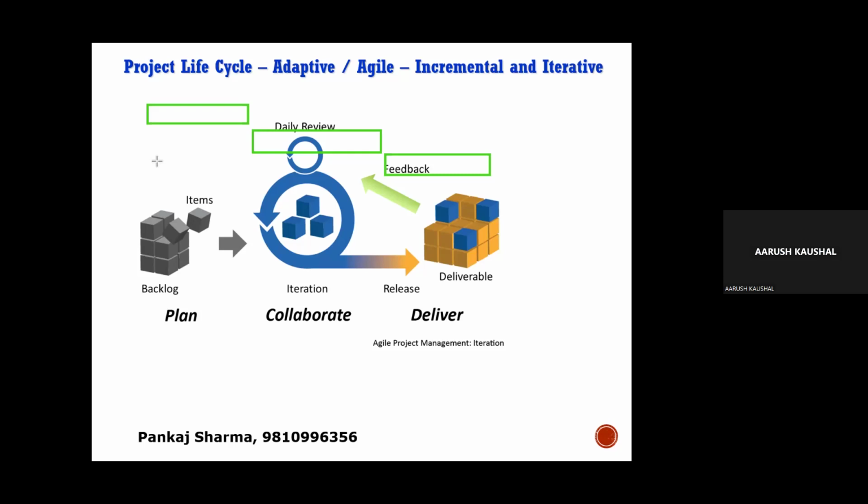Now see, these were phases. If the project has a very high amount of uncertainty, you cannot plan till the end of a phase, which is, let's say, 2 to 5 months. So the time horizon till which you can see clearly reduces, and you will have to decompose these phases into small sprints.